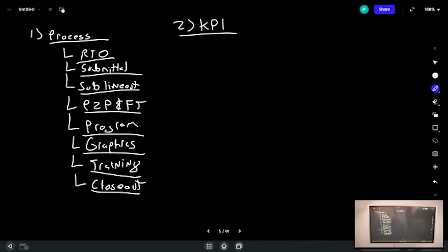So they missed an air handler. They missed the fact that there's a BACnet interface. And you train the sales team: hey, you missed this, you missed that. Typically you want to do re-estimates on projects with costs of 50,000 and up, but it shouldn't be done on every project. You should do an RTO on every project, in my opinion. But re-estimates are going to be driven by what was missed in the scope.